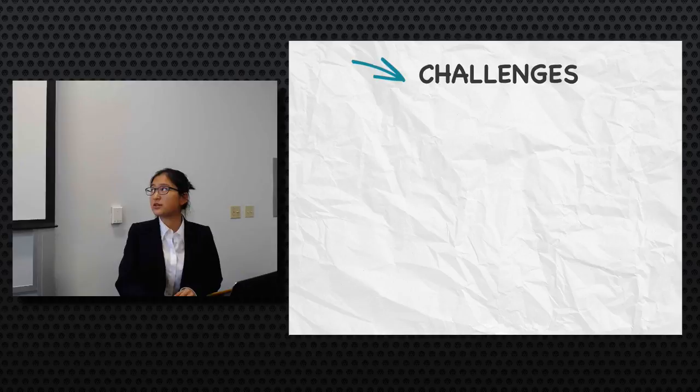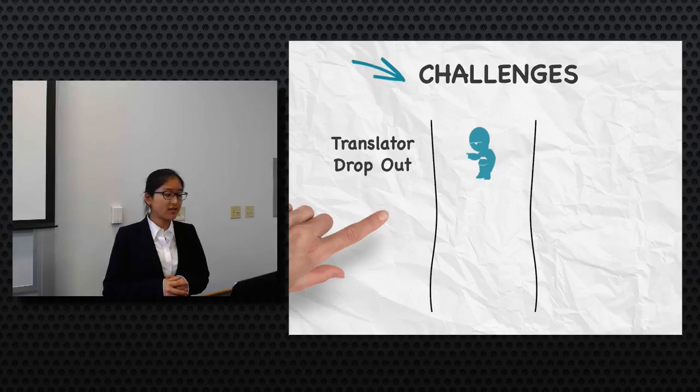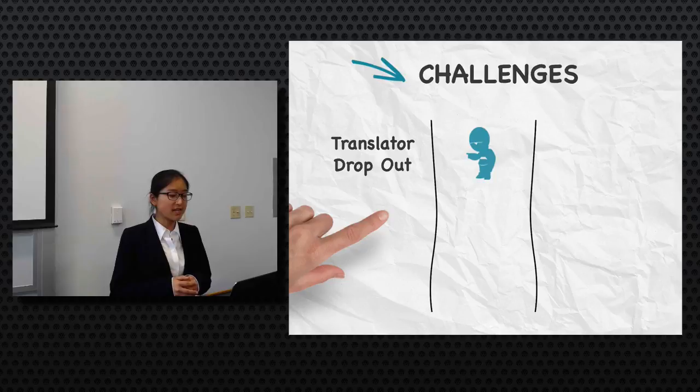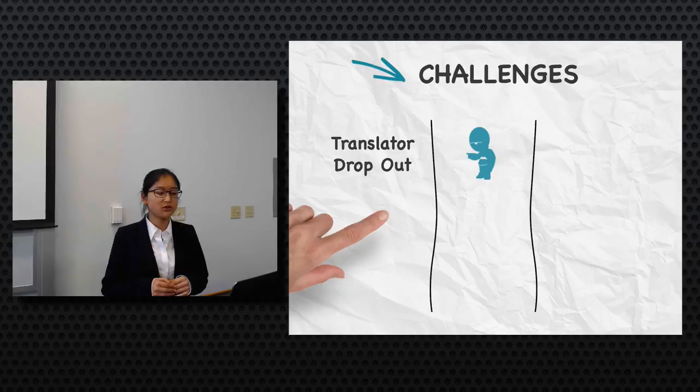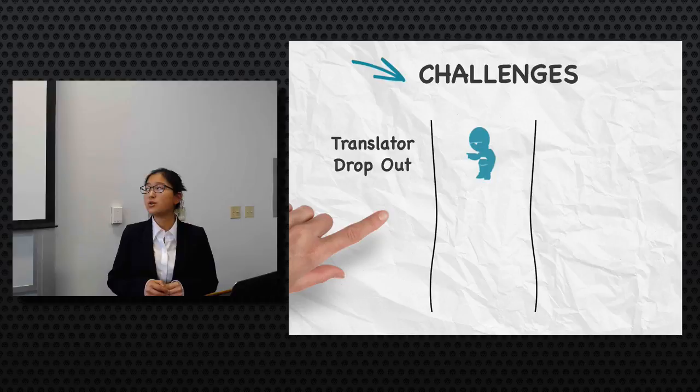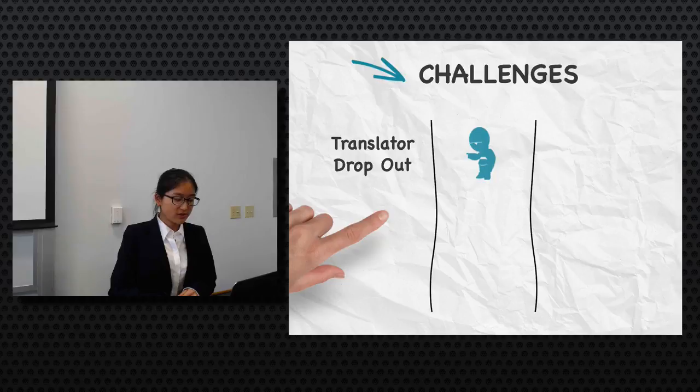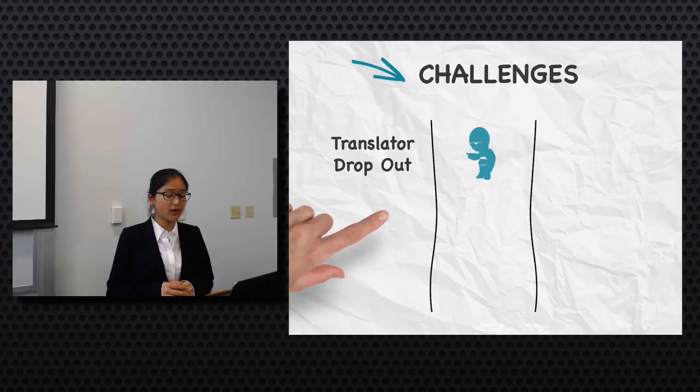The challenges for this document translation are two. The first is that one of our translators dropped out during our process. What's worse, he didn't tell us he was not going to work with us until I approached him. So thanks to our sufficient translator pool, we successfully contacted a translator who was willing to work with us and translated the document in 2 days. The lesson learned is that in future projects, we will try to confirm our translators' working time again and again and try to recruit more vendors in our recruitment process.